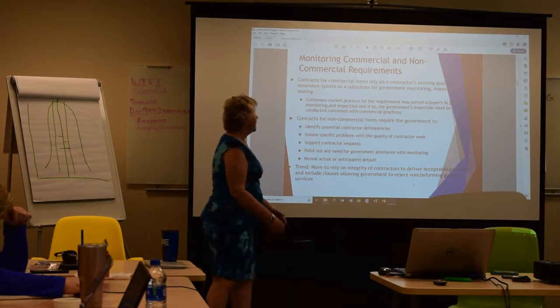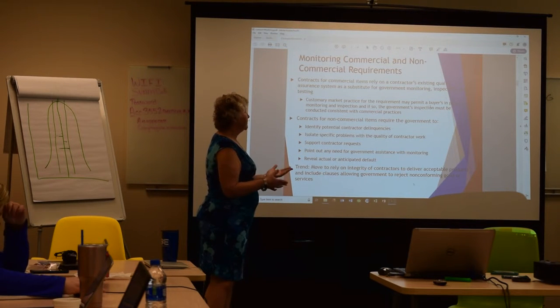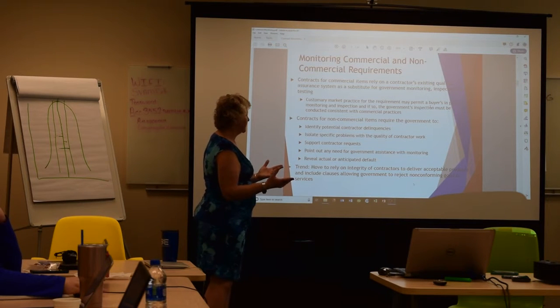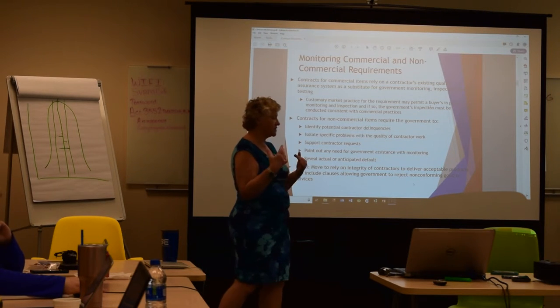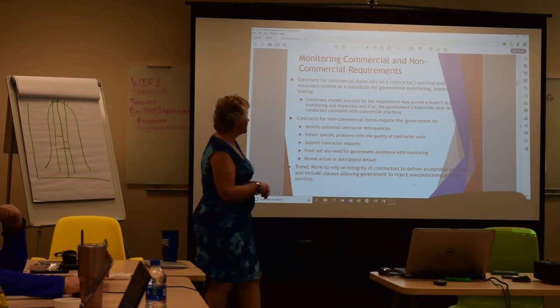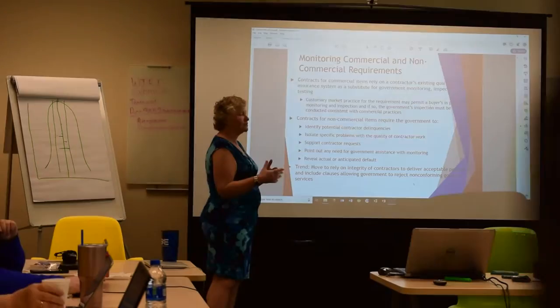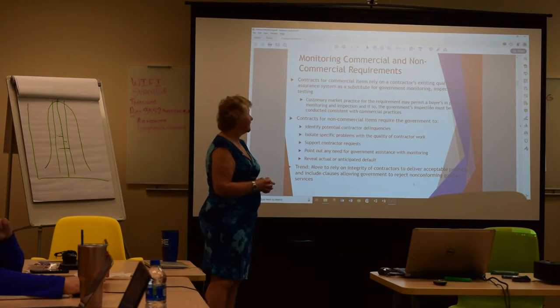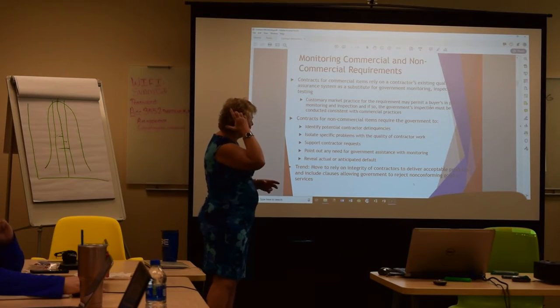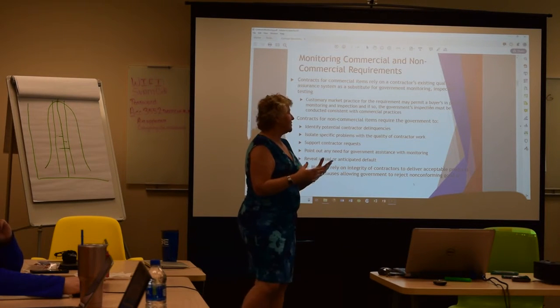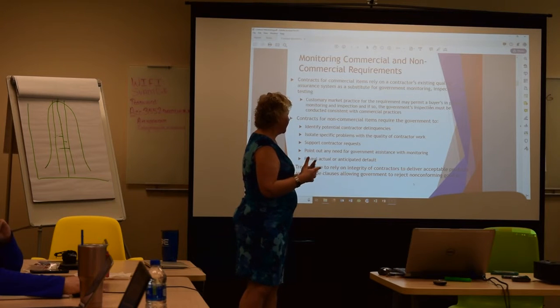So there's a difference between monitoring in commercial contracts and non-commercial contracts. If you're providing your commercial products or services, they assume you have your own internal quality assurance system and that they don't have to be doing all that monitoring with you. They also figure that there's a customary market process that permits a buyer to have inspection.